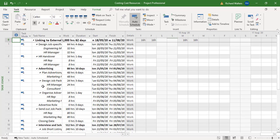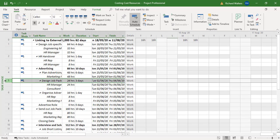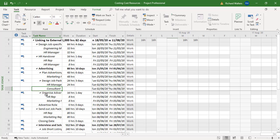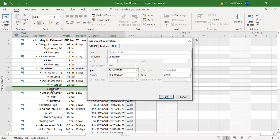Now for the design job pack, which is this task here, here's a consultant, but I can now assign a cost to this consultant in task usage view. I can double click and here I can add a cost. So here's the cost. We go in and I'll put in 1,500, that's what the charge is. Click OK.